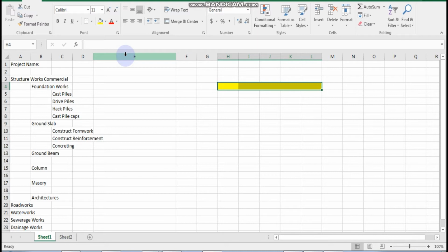But a bar chart is a very simple, very readable, very easy way for the client to understand the sequence of the activity and the duration. At one glance you get a lot of information. You get your work breakdown, you get your duration, you get your start and end date, you get the sequencing of the activity, you get the flow of how the project will flow.